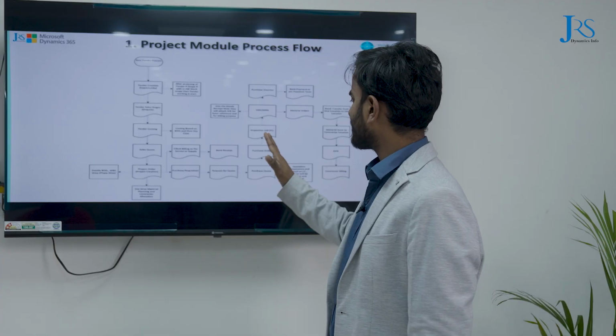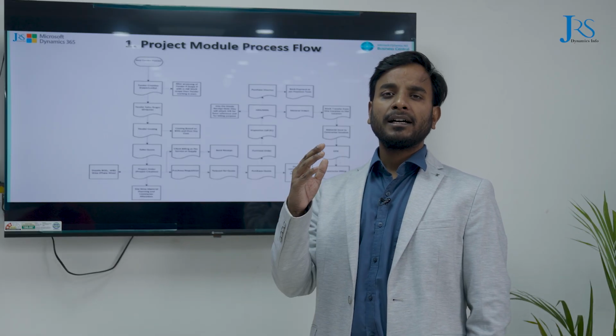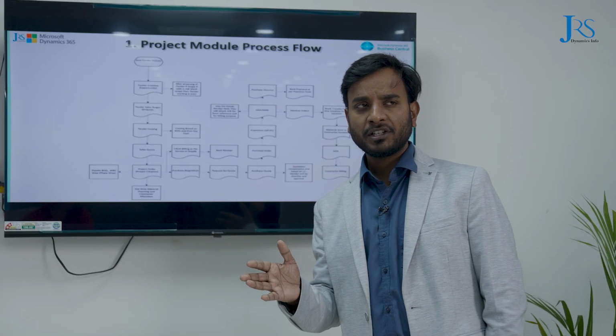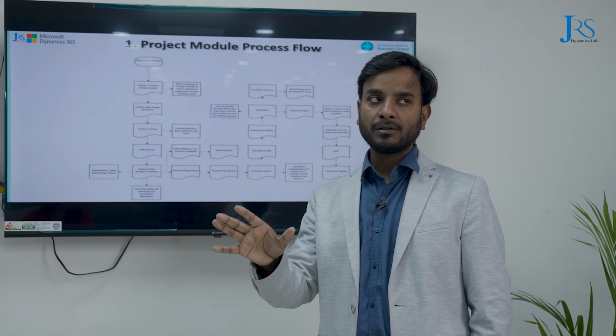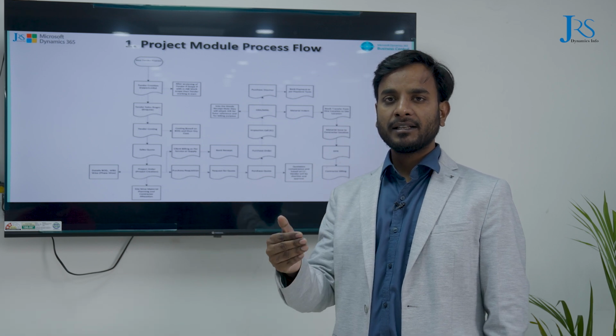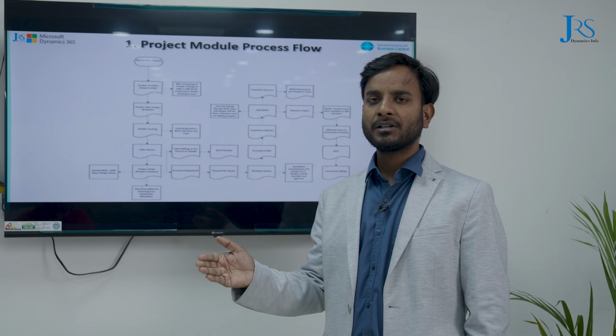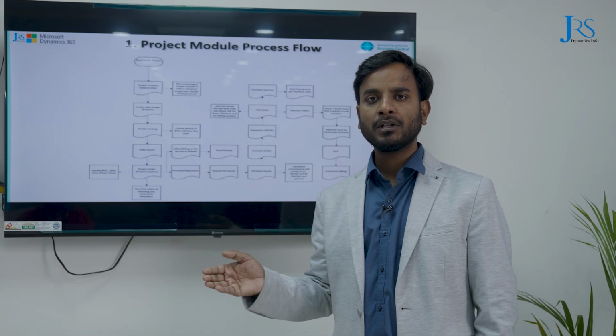We can record the inspection call. Based on the inspection call, the SRN is performed in the system. Based on the SRN, our customer shares the accepted quantity. Based on the accepted quantity, we receive the material and do the invoicing to our client also.